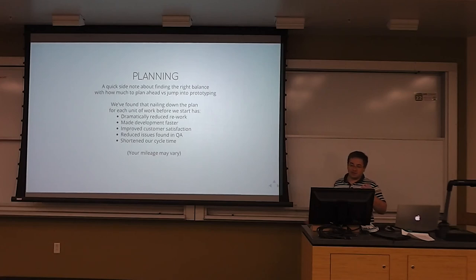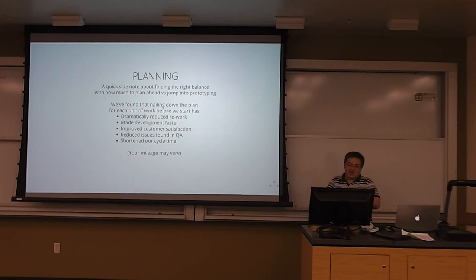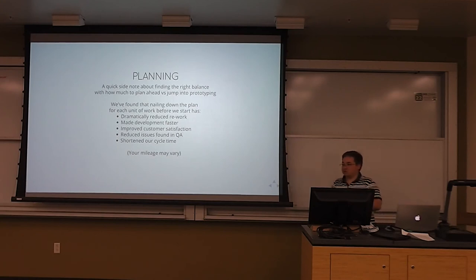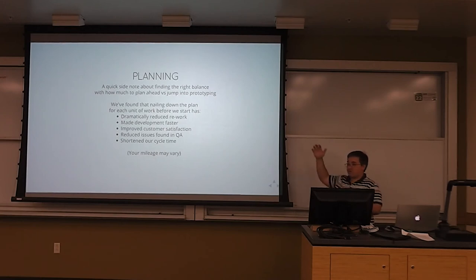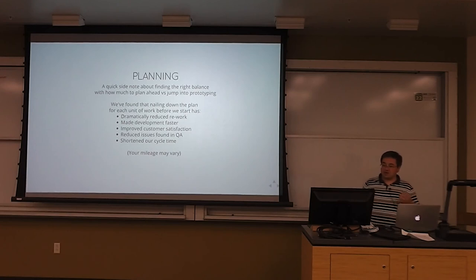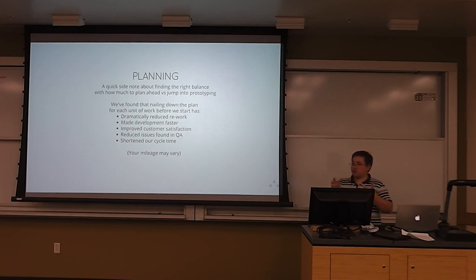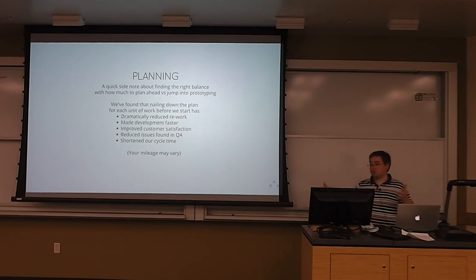A quick side note on planning: Kanban doesn't express a stance on how much planning to do before coding. For us, what's worked well is nailing down the plan as much as we can before starting work, without overdoing it. If we have a project expected to take a month or two, we'll spend a couple of days just on planning without building anything — to make sure we've thought about everything and identified all the pieces. We identify all tasks upfront. This has dramatically reduced rework, made development faster, improved customer satisfaction, reduced QA issues, and shortened our overall cycle time from design to completion.